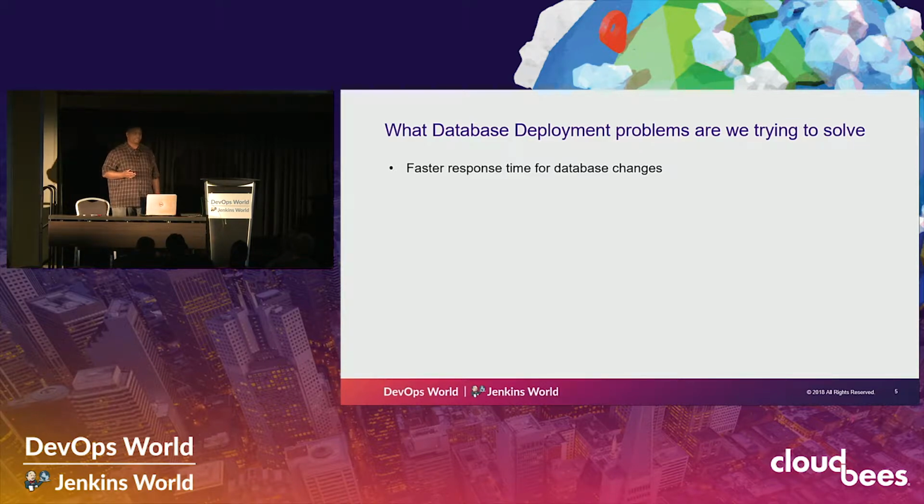So if you're working on a Scrum team and you have a 2-week sprint cadence, and that feature was dependent on that database change and that sprint goal, you could potentially risk not achieving that sprint goal because of the lag time in getting that database change pushed through.